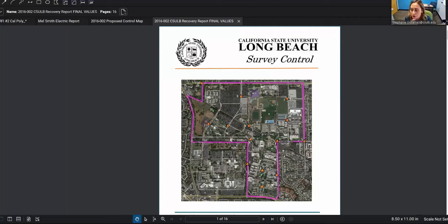Another option is to change order it to a contractor that's working on campus, or ask a TOCA contractor to do it under a quick pre-con authorization, because a lot of times those contractors have quick access to either in-house surveyors or external surveyors, and they're already on contract. It would be pretty quick to execute a pre-con authorization for them to do that for us. Those are just two ideas off the top of my head, but we can talk about it more after this meeting.